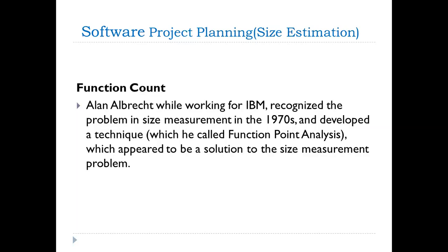The next approach is called function count or function point. Allen, working for IBM, recognized the problem in size measurement in the 1970s and developed a technique called function point analysis, which appeared to be a solution for the size measurement problem. Allen proposed a solution for size measurement with the help of function points: with the help of requirements as well as design, we are able to estimate the size of the projects.